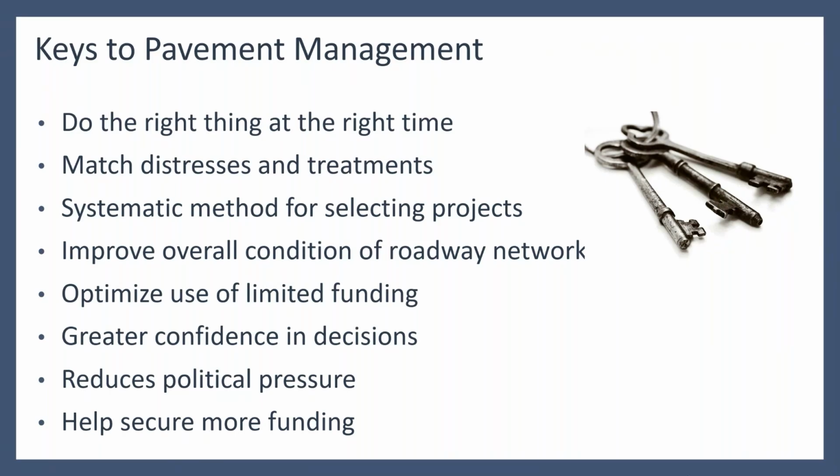If we have a roadway maybe that's starting to deteriorate, it's not that bad, and so I put into my schedule that I need to do some minor corrective action to this roadway, but then there's a budget cut or we have delays, and then we push that fix down the road a year or two. That roadway is not going to be in the same condition that it was when I planned that corrective action. So making sure that we do it at the right time and make sure that the distress at the time of the project is appropriate for the type of treatment that we're going to give it.